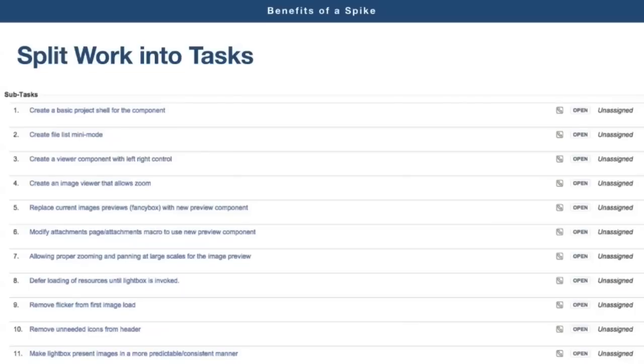But when do you run the spike and how do you do it? Whether you're trying to add support for a new type of database for an existing application, or adding a feature for an existing application, the proper place to start is spiking. Almost any task is actually good for spiking. If it's a technically difficult task, if it's an integration story, and especially if it's a time-critical task where the accurate time estimate is very important, spike is a prime candidate to start.